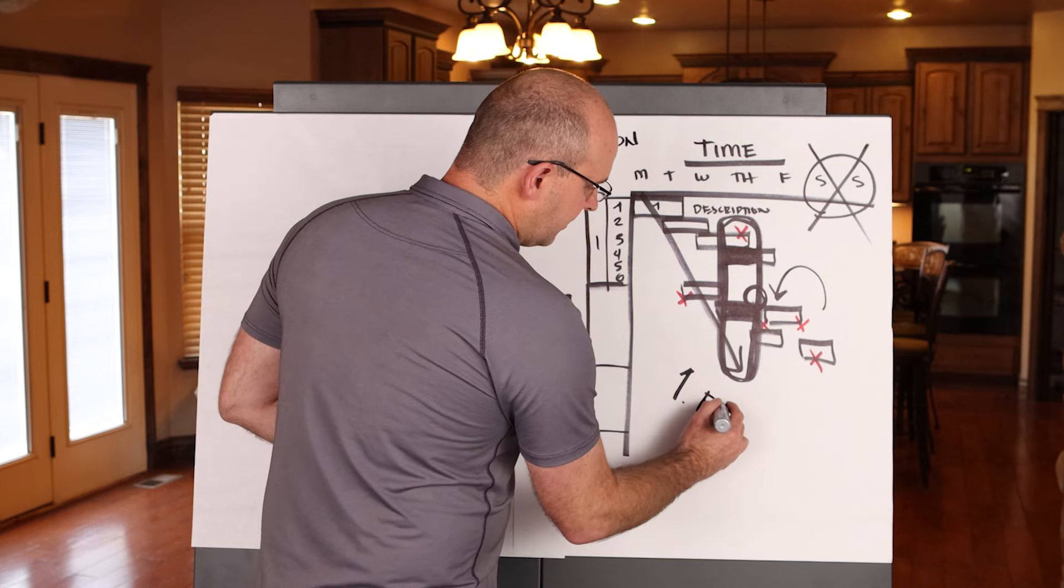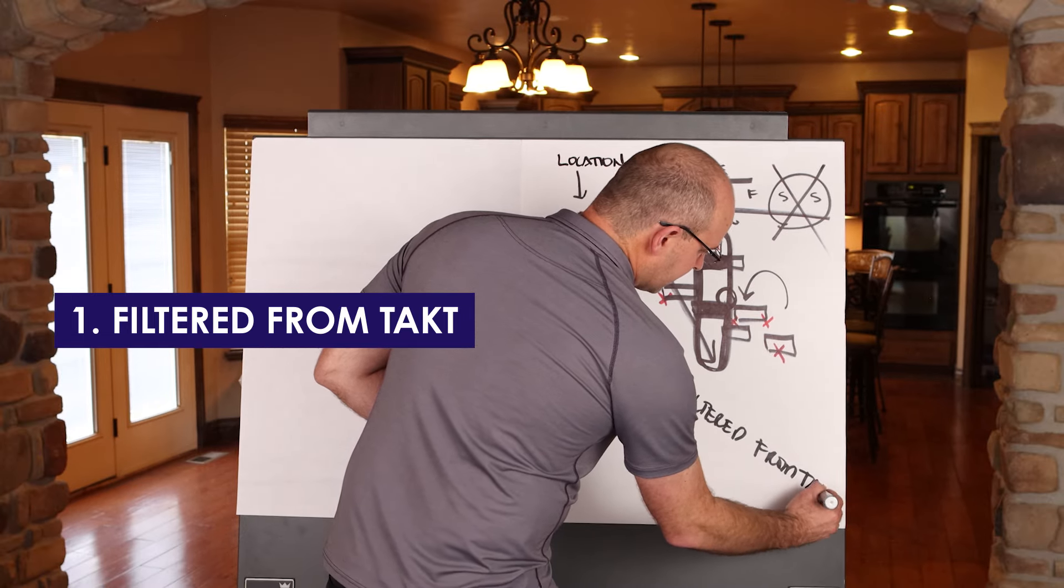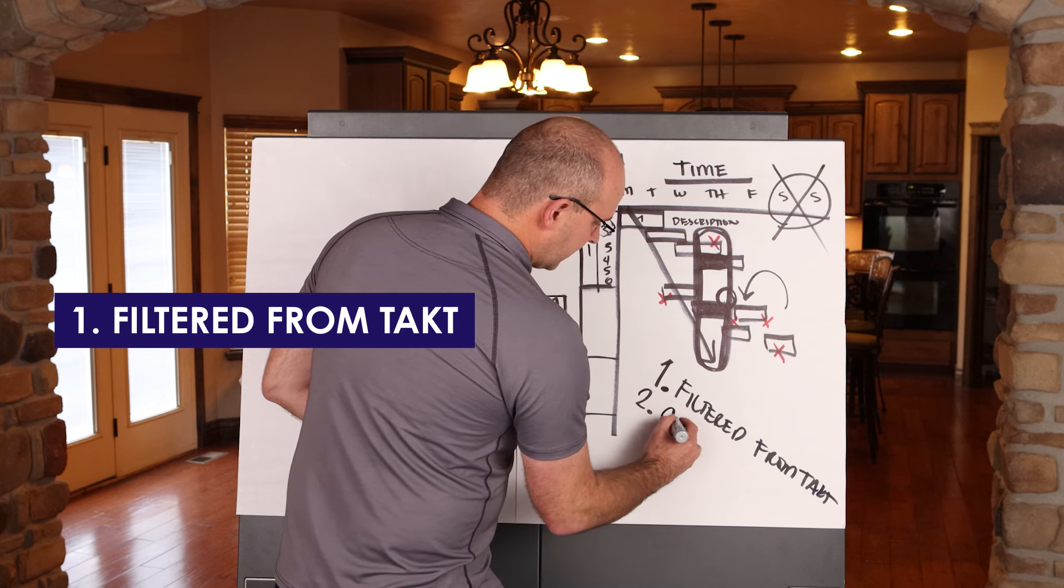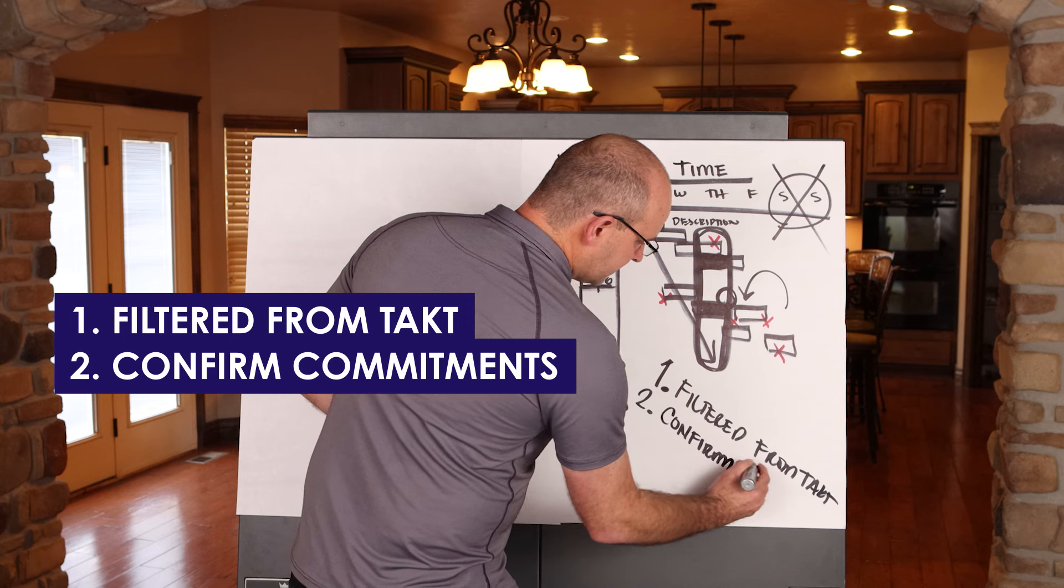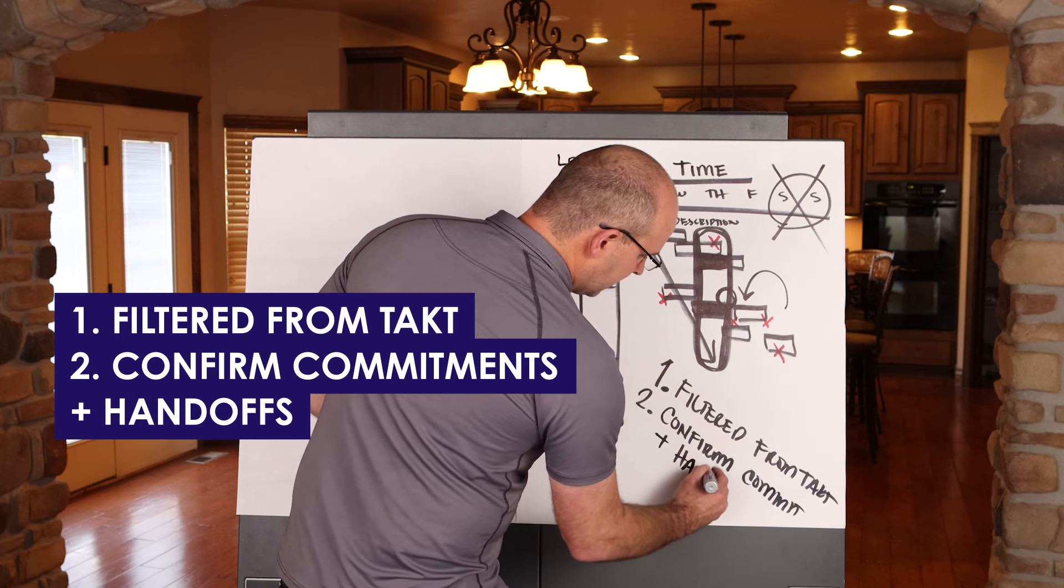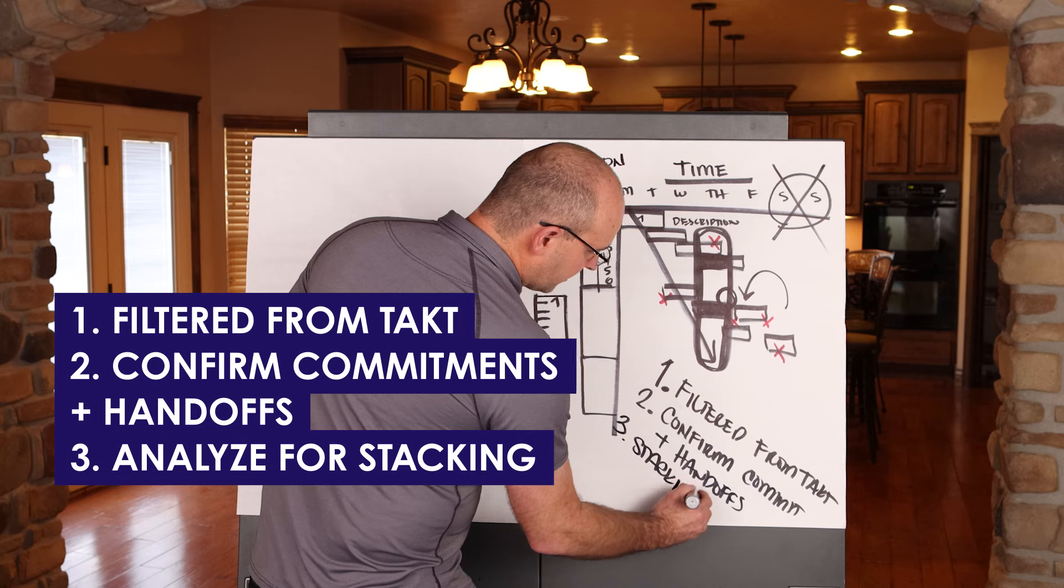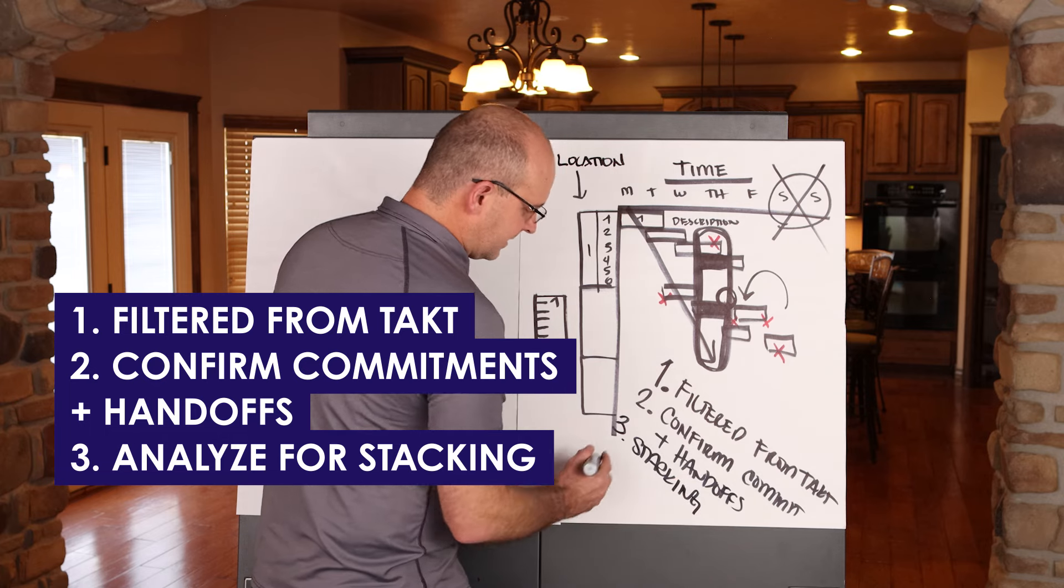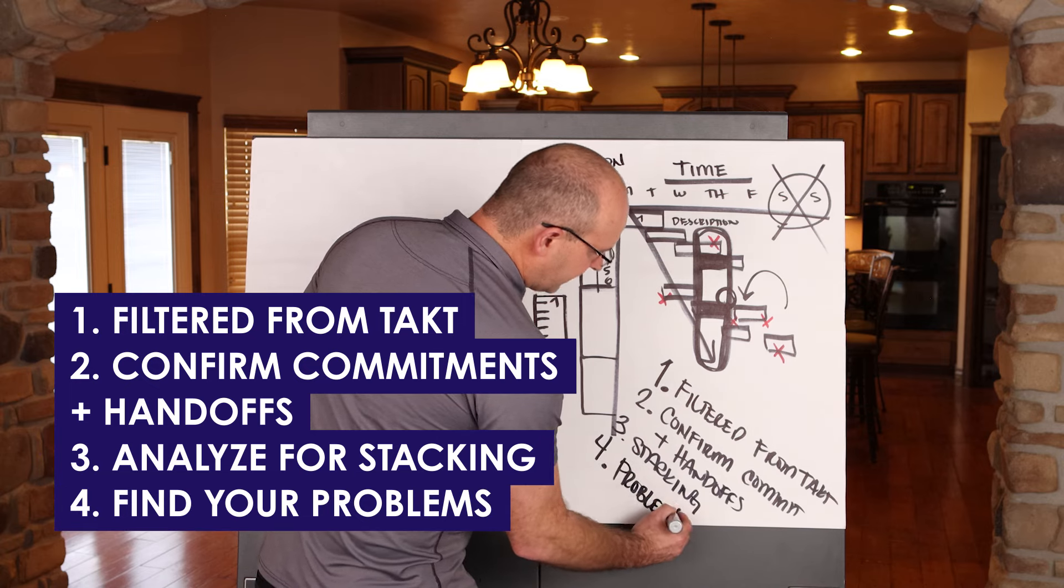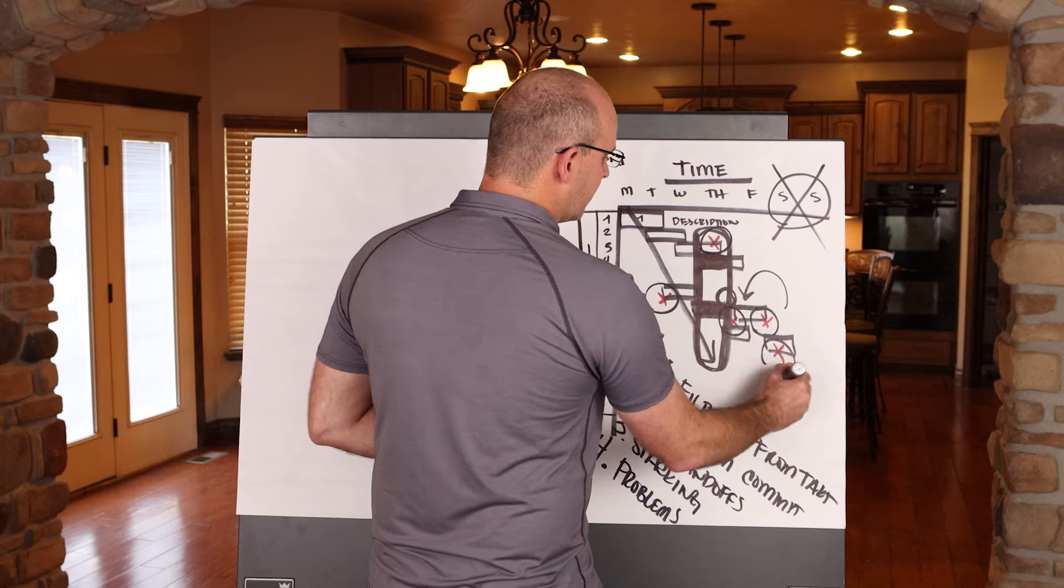So hopefully you're following this process. You've filtered it from tact. The second thing that you're going to do as a part of this process is you are going to confirm commitments, so I'm just going to write commit plus handoffs. You are going to analyze for stacking or burdening. Make sure that there's enough room to actually fit in these spaces. And number four, you're going to find your problems. When you find your problems, you will hopefully be able to solve those together as a collaborative team before they affect the work in the field.